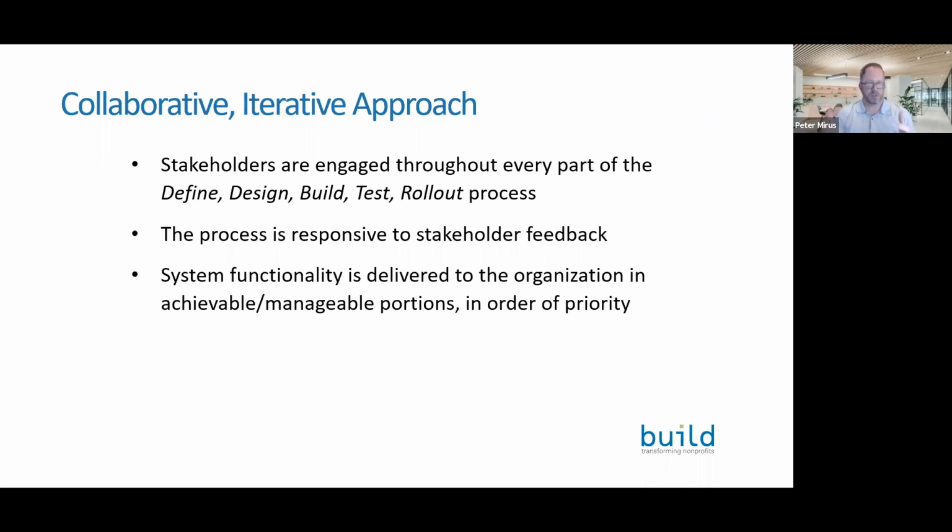And then you're doing the define, design, build, test, rollout process to the extent possible by batching groups of related or prioritized system functionality together and then delivering them to the organization in manageable amounts in that order of priority.